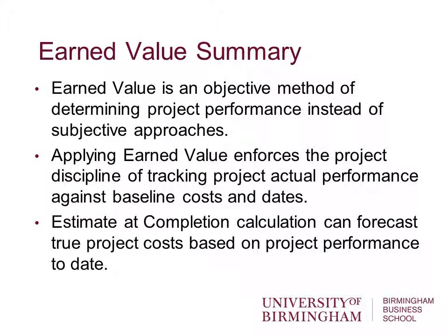Now, I will just return very briefly to the point I made earlier about whether this is good or bad. Okay, so broadly speaking, if we're behind schedule or over cost, then that can be seen as being bad. We are in a problematic situation. However, now here's the interesting thing. If we're ahead of schedule or under costs, is that necessarily good? What that implies is actually we've planned incorrectly. And in fact, bad also suggests we've planned incorrectly, because the reality is not bearing out our planning.